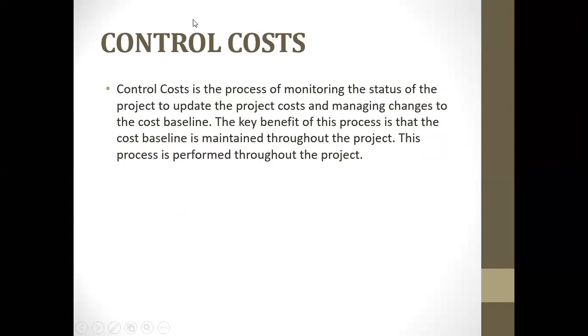There is something I will tell you here before I continue. There is one basic mistake that project managers make, especially those that are coming new into the project environment. If you're not careful, your first project as a project manager always has a case. Why? Because maybe you calculated the project at 500 million, and you believe that your project profit or your net return is 100 million. And all of a sudden, you started spending 100 million without having finished the project, before knowing actually whether you have 100 million or not. And perhaps before the end of the project, you could have finished the 100 million.